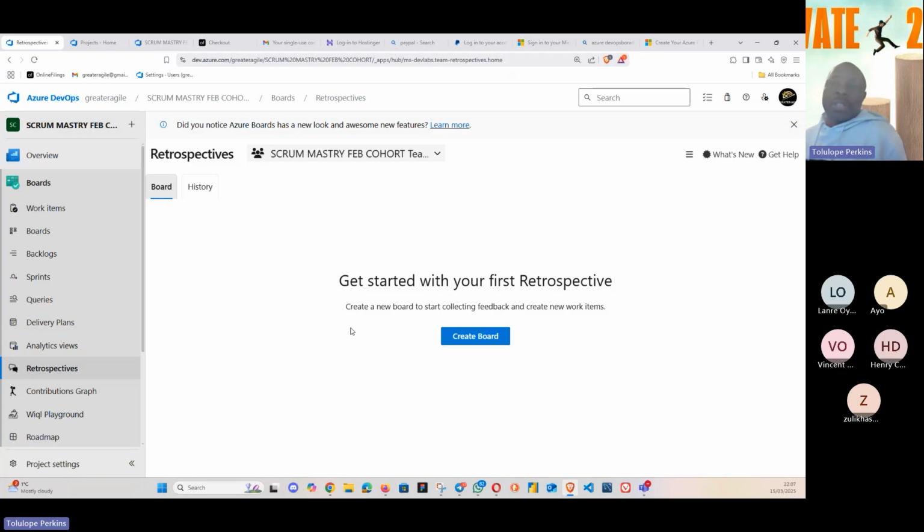That's what the Scrum guide says anyway. So how did we fare last sprint, and then how can we improve? The input is the team, our process, and the output of every sprint retro must be something. There must be at least one high level improvement that we've identified.